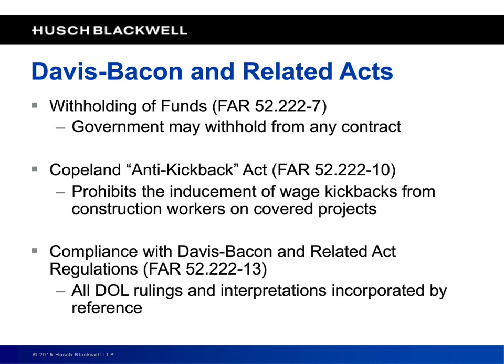Withholding of contract funds. This is the clause that says the government can withhold funds from any of your government contracts that they consider necessary to take care of Davis-Bacon Act related act coverage problems. So if they see that you're not in compliance on one contract, they're going to take the money necessary to cover payment of prevailing wages for workers from your other government contracts. The Copeland Anti-Kickback Act makes it illegal for an employer to charge its workers for the privilege of working on a Davis-Bacon Act project.